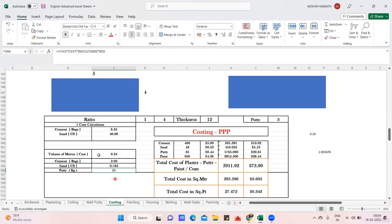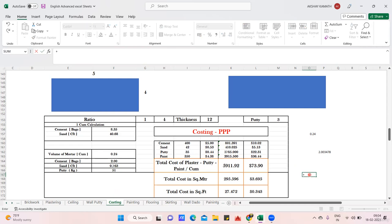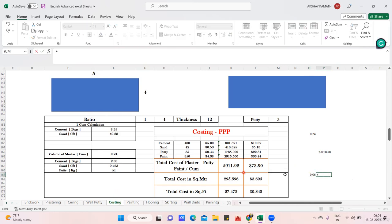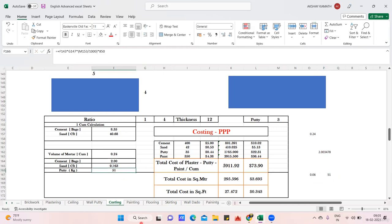For putty, I want the volume and then multiply by 850 to get putty in kg, since 850 is the density of wall putty. Volume = 5 × 4 × 0.003 (3mm thickness in meters) = 0.06 cubic meters. Multiplying by 850 gives 51 kg of putty required.